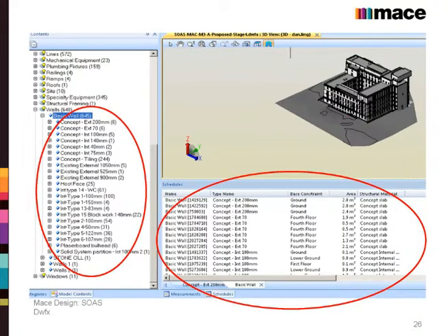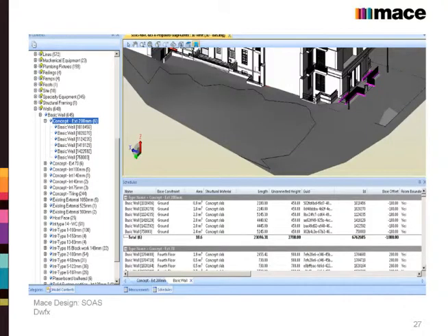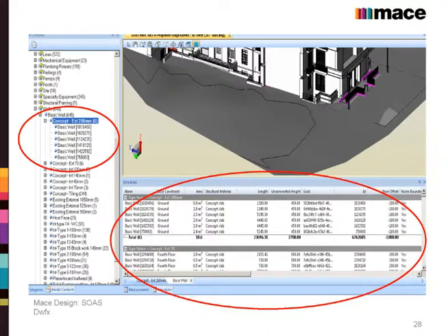But it now means that when I pull off the schedules, I have to go through and sort all the information. Yes, it is at the click of a button, but I can guarantee that now my trust is a little bit lost because I've been saying, oh, can I have it like this as per my BIM protocol or execution plan? This is what I'm seeing in my mind, and we're not getting it. So if you lose the trust in your team, we'll revert back to DWGs and PDFs. Because if we can't visually see it and it's not labelled in a way that we can use it, we're not going to use it.